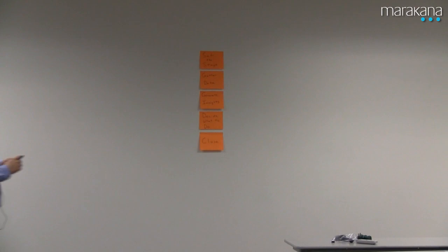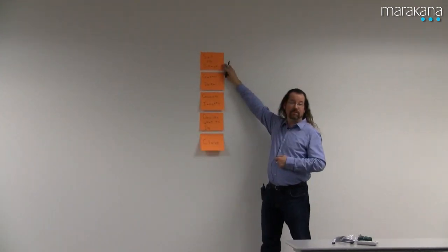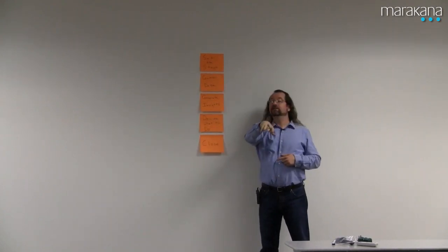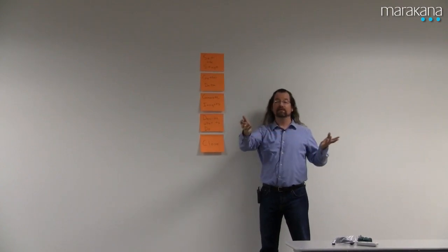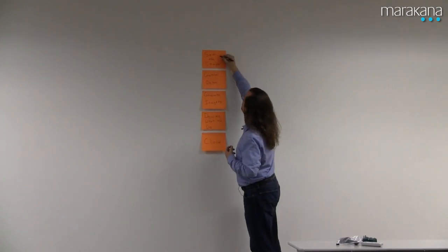Time-wise, you want to dedicate about 5% of the total time you have for your retrospective to set the stage. So 5% of 60 minutes. Who's good with the math? 3 minutes. Is that right? 3 minutes. Okay, we got 3 minutes to set the stage.